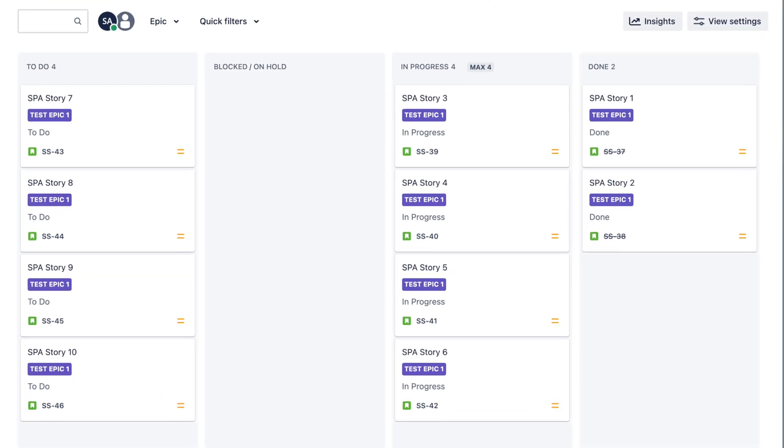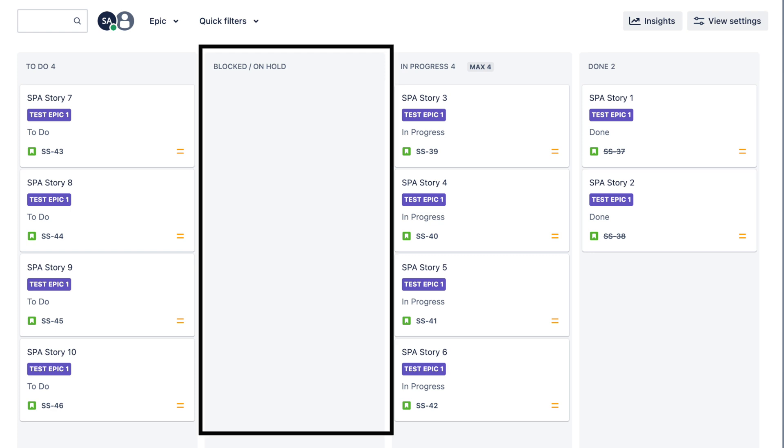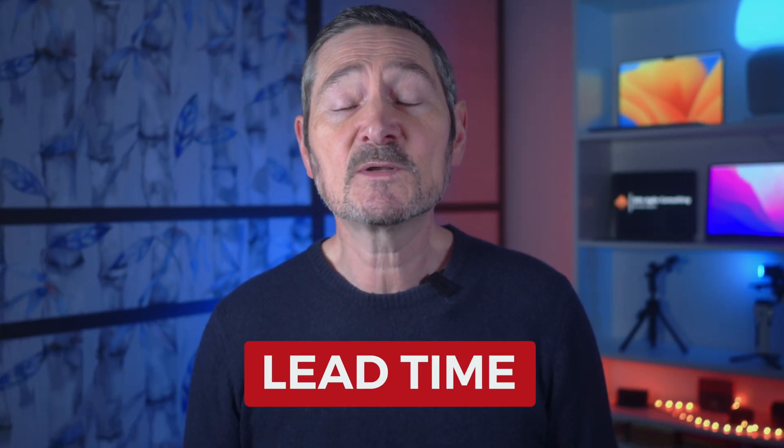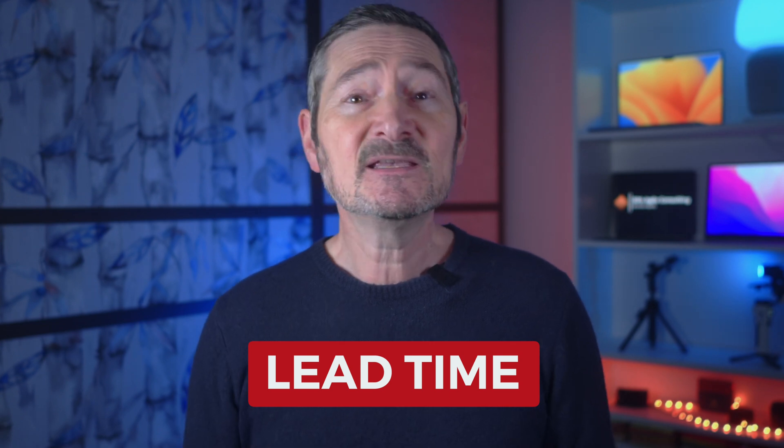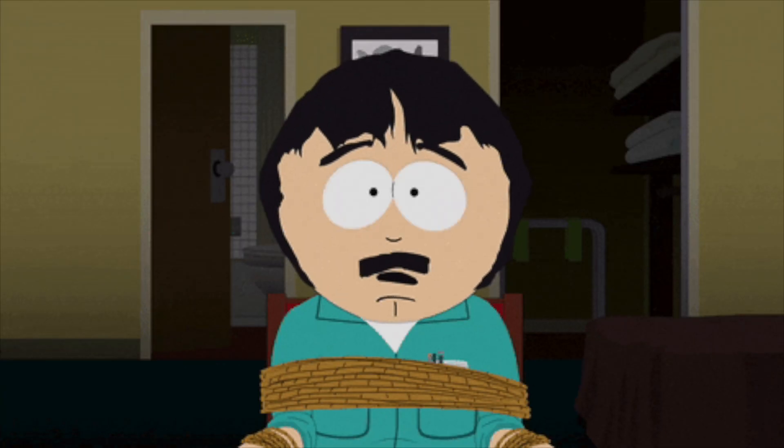Your workflow will probably vary, but base it on this concept. Cycle time will include any time a story spends in Blocked or On Hold. If you base your cycle time on when a story first lands in your backlog to when it's eventually done, this is not cycle time — it's called lead time. Lead time is also a very important metric. It tells you how long it takes to get a story done from when it's first asked for. But I wouldn't recommend starting with this, as you can end up tying yourself in knots and getting nowhere. This is best looked at after you've got cycle time under control.